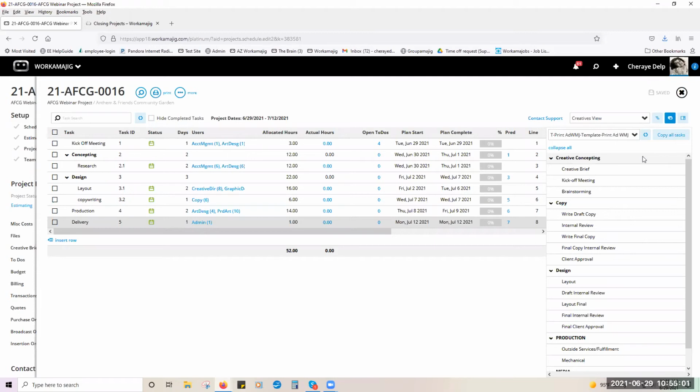All right. Also, I wanted to mention with your project schedules, the system is designed to skip weekends. And if you guys take it an extra step and add in all of the company holidays into the public calendar in Workamajig, then it's designed to skip the holidays as well. So for example, let's say that we had a holiday on Monday and the task was scheduled to end on Monday as well. Well, the system is designed to push it out one more day past the holiday. And again, it's going to do the same thing for weekends.